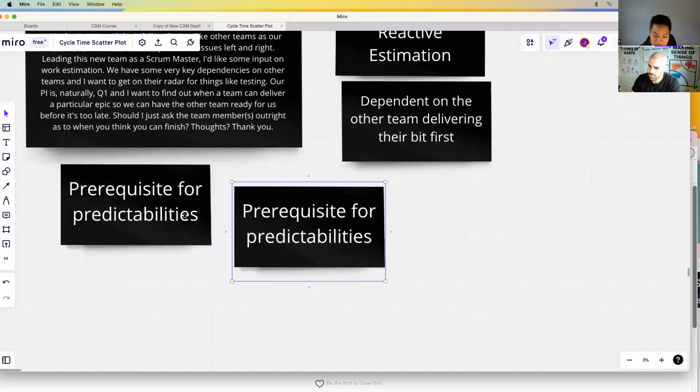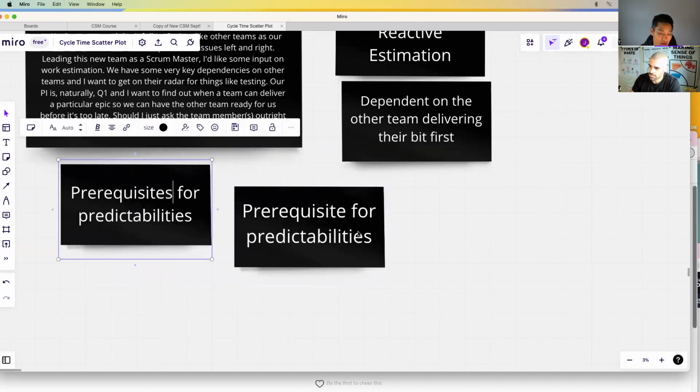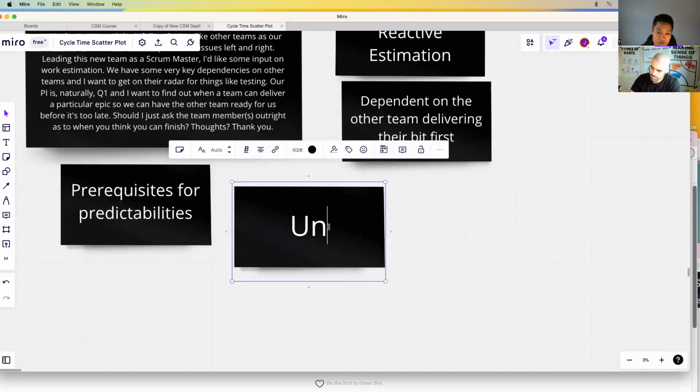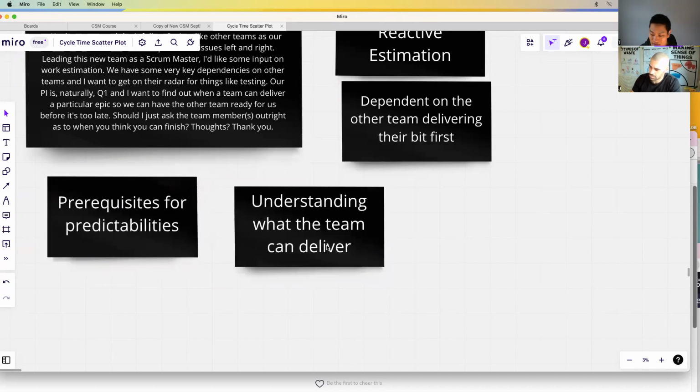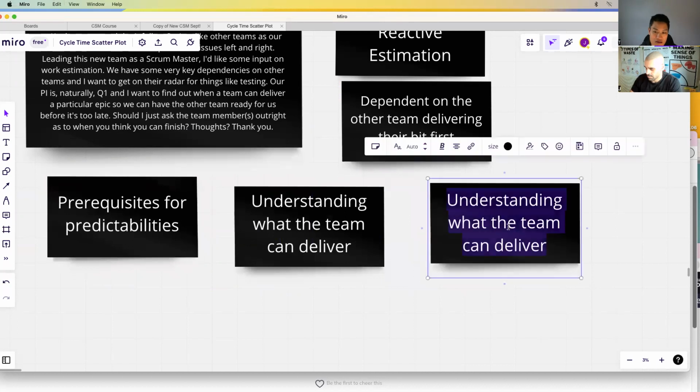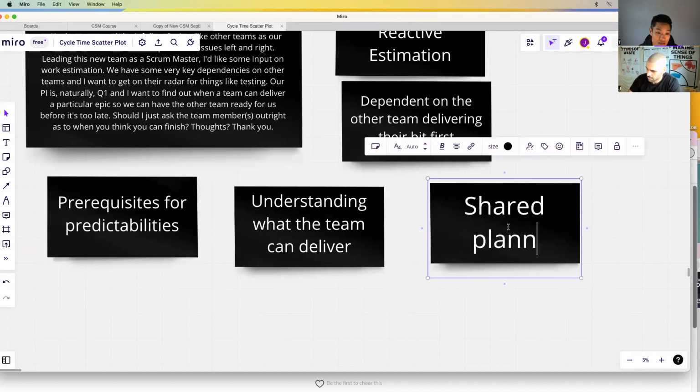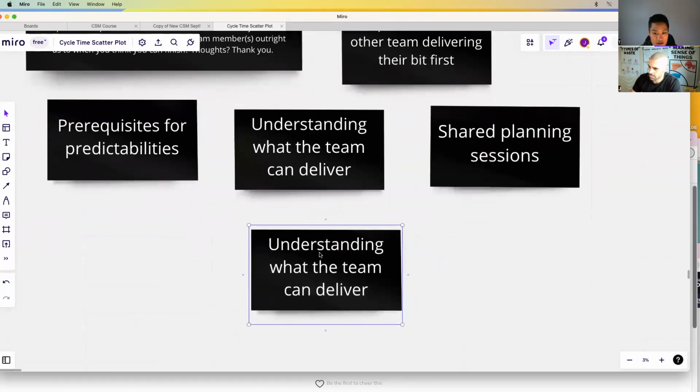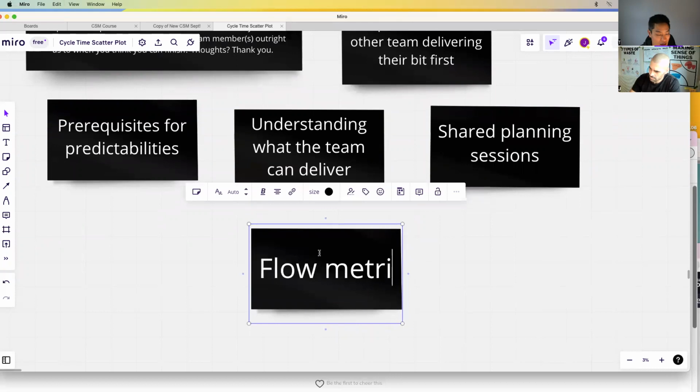The second thing is that if I wanted to get some more information out of them, I'll start looking at, is that team working in a stable way? Are they limiting their WIP? Are they right sizing their work items? Are they successful at meeting other commitments that they've had to meet in the past? What method are they using to come up with how certain they are that they're going to meet that date? Are they using just a straight burn down? Are they using Monte Carlo? What sort of method are they using to come up with that whether they can meet that date or not?